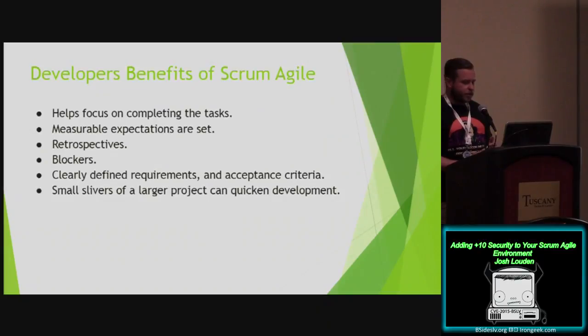Short daily updates are given in small meetings by individuals about their specific tasks, just to recap either the previous day or what they intend to work on during the day, and discuss any blockers or issues they might have or foresee to complete a specific task. There are measurable expectations of what they can accomplish on a specific task for a defined length of time.